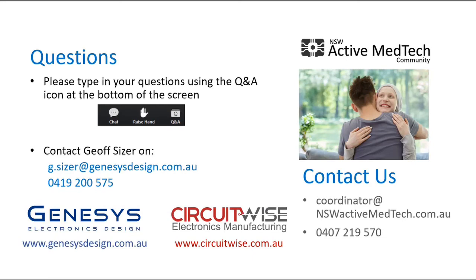Well, there are some things that simply take time that you really have difficulty compressing. So going from a specification to a sound circuit schematic, you can take the approach of having multiple people involved, but you then add to the net cost because you lose efficiency. So assuming you have one lead designer and maybe a couple of other people participating, it just takes a certain amount of time to do the work. Similarly with a circuit board layout, that's typically done by one person and it simply takes the time it takes. In parallel with that, you can be developing your software. So probably the biggest chunk of time is that circuit schematic and circuit board layout work.